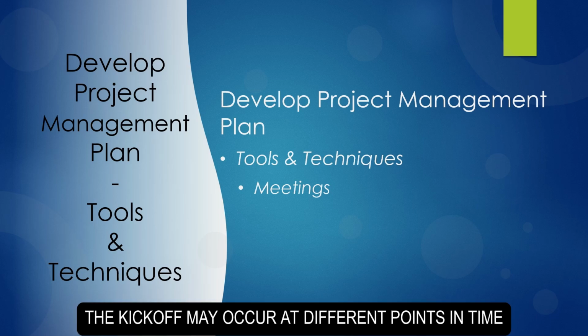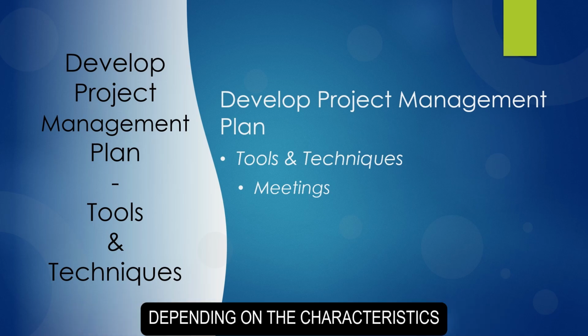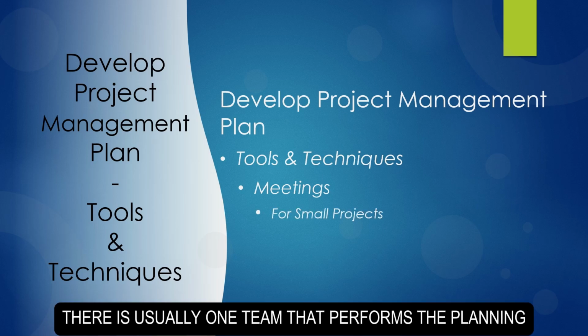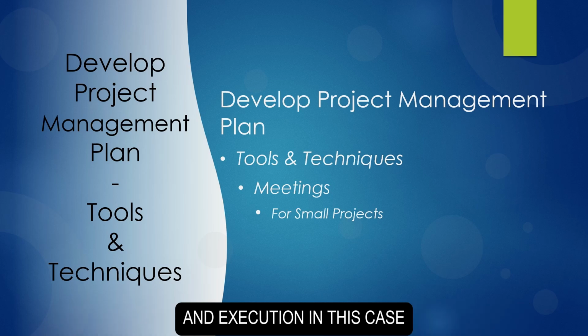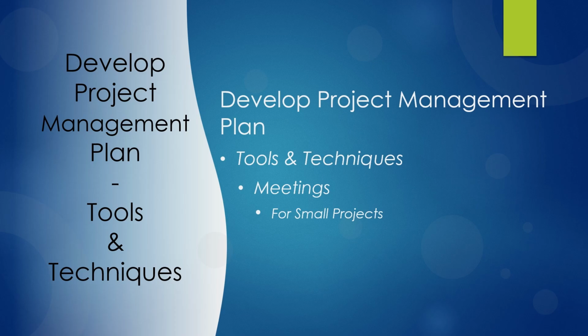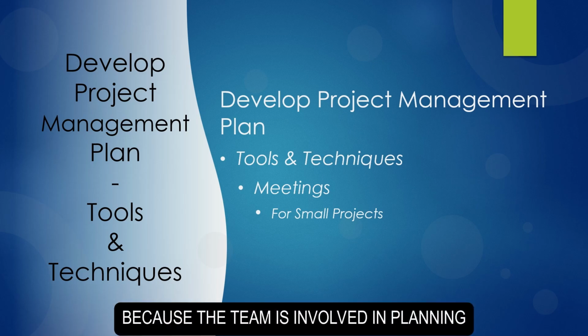The kickoff may occur at different points in time depending on the characteristics of the project. For small projects, there is usually one team that performs the planning and execution. In this case, the kickoff occurs shortly after initiation in the planning process group because the team is involved in planning.